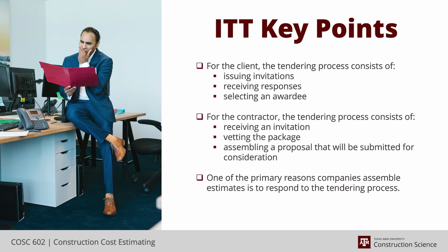And then they'll actually estimate what's left, the forward-looking prices, and then create a new baseline. Those two situations aren't really responding to a competitive tendering process, which is why I'm saying it's one of the primary reasons; the majority of the time it is responding to this tendering process.